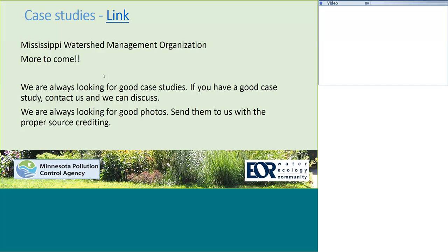I think they're relatively easy. I think that's one of the check sheets: it's good to list where you're getting your supplies from when you initially set up the system, and how important it is to have all the different pieces understood up front going in, so that it is an easy phone call. You've already identified the vendor that sells that.